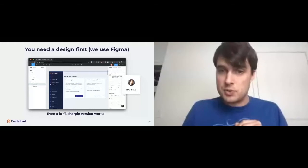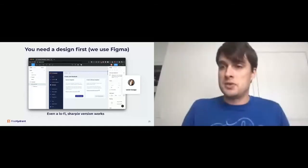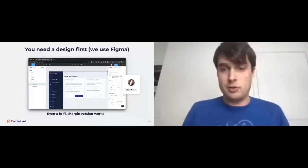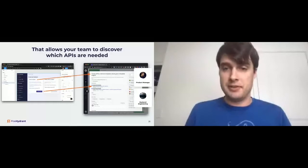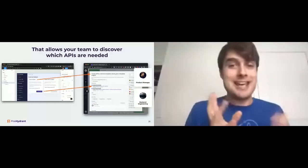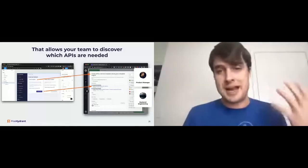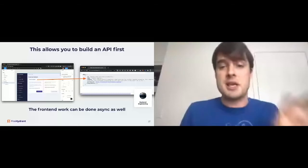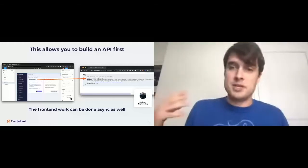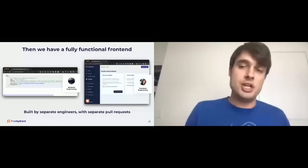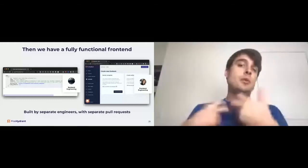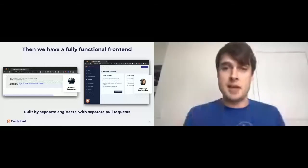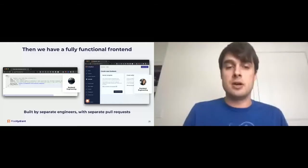Because once you know what's going to be on the page, you can start to kind of figure out, okay, well, that starter template over here, that's going to need an API, something coming out of the API to show that we're going to need something to show the text here. What about this link? What is this? And then on the right, what happened is we created a ticket in Clubhouse to basically represent the information and the API that would need to be created to build this page. So Dylan and Justin and another gentleman, JP, wrote this out and worked on it. And what happened is that backend engineering was able to deliver an API endpoint. So the API endpoint actually came asynchronously to the frontend work. This is something mind blowing, but this is really just how we think of our APIs and how we build them and why we do it. Because what's going on while this API was being built is the frontend was also being built. Hillary is working on the starter template page, where she knows that I'm about to have an API. Once the API is released, we're able to kind of mesh the gears together. And then we, lo and behold, we have a create new runbook page with templates. And obviously there's a whole bunch of other API endpoints that go into this, but you get the general idea of how we break down our builds.